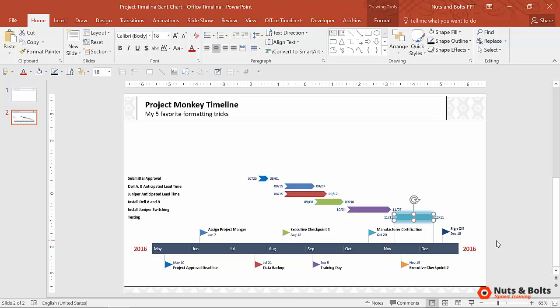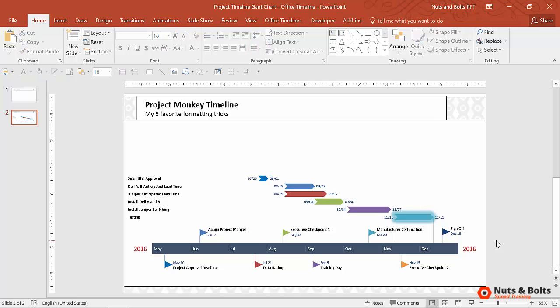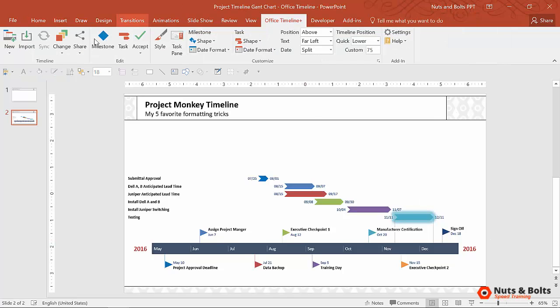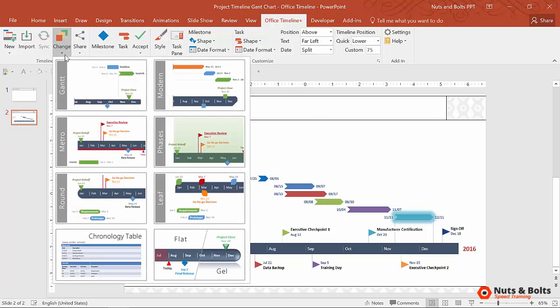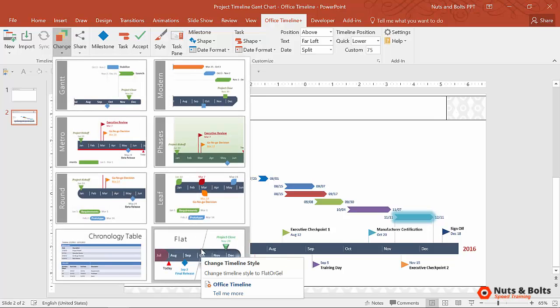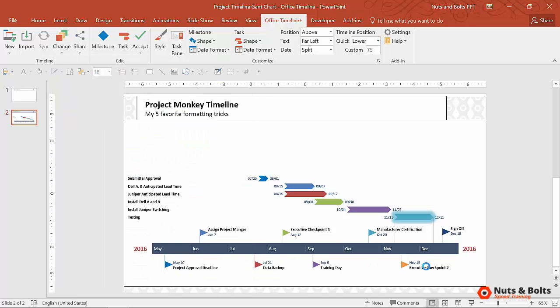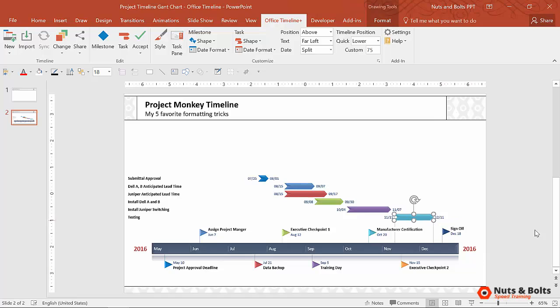...and then I decided I wanted to change the macro level formula. Watch what happens if I come to the Office Timeline tab, I select Change. I'm going to go back to the Gel look, so I'll select Gel. Notice that my manual formatting adjustments were wiped out.